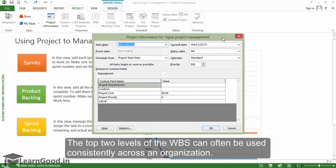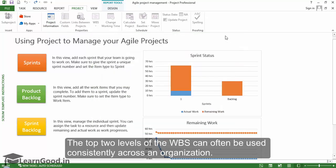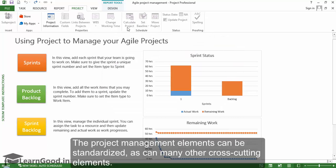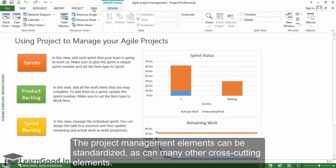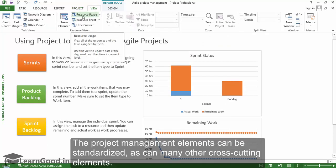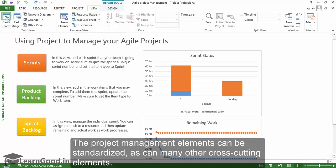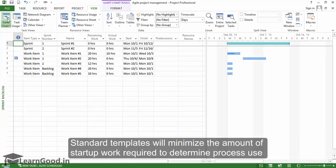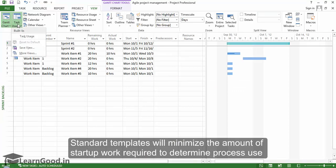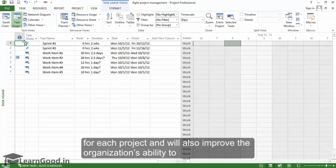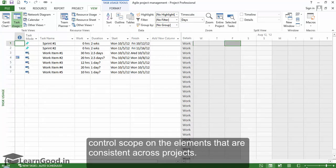The top two levels of a WBS can very often be used consistently across an organization. The project management elements can be standardized, as can many other cross-cutting elements. Standard templates will minimize the amount of startup work required to determine process use for each project and will also improve the organization's ability to control scope on the elements that are consistently used across projects.